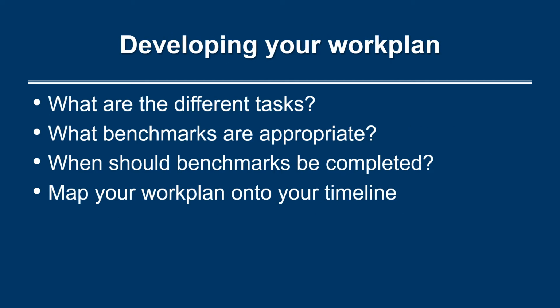The work plan should list all of the tasks that need to be completed for the project. These may be very specific, such as scouting locations, developing tools, or submitting reports. It should also include who will be doing the work, as well as what work you expect your collaborators to do. For each task, decide on an appropriate benchmark so that you know when the task is complete.